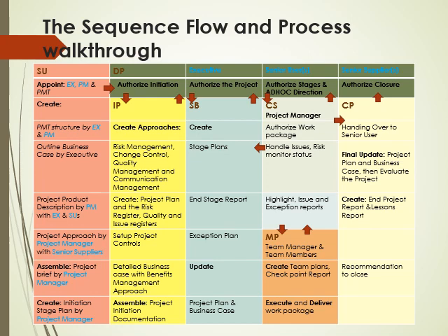registers will now come up. Once the project plan is created, remember this, it is only a draft until we consider the uncertainties inherent in that plan. So that is when we now identify all the possible uncertainties that could occur during the project, and we put it in the risk register. Of course, the quality register will also be created, as well as the opening of the issue register. And the issue register is going to be blank here because we don't have issues at this point.